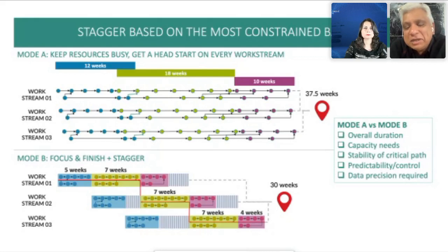If my project is getting done in less time, and the peak resources are coming down, is my cost likely to go up or likely to come down? There'll always be 1 or 2 instances where the general rule will not apply. But in general, the costs will come down because, first of all, your project is getting done faster. Your overhead costs are coming down. Your management costs are coming down. Your coordination costs are coming down, right?